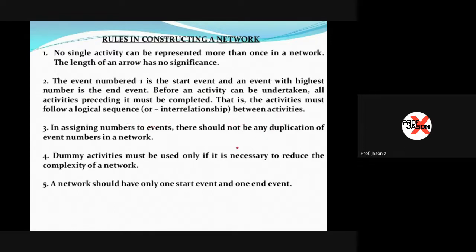In assigning numbers to events, there should not be any duplication of events numbered in a network. Dummy activities must be used only if it is necessary to reduce the complexity of a network. And then finally, a network should have only one start and one end event.